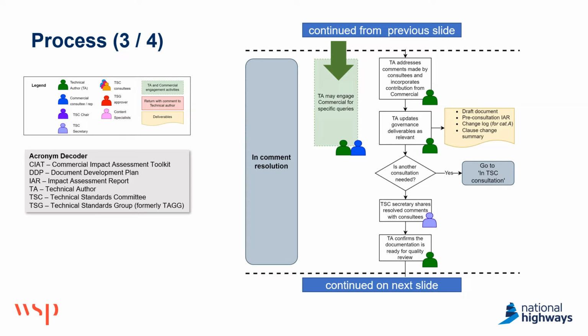Just to clarify, this is about completeness of deliverables and MDD compliance, but the quality checks will stay with the Technical Standard Committee and the relevant chair. An important deliverable that needs to be completed at this stage is the change log. This will be used by commercial for quantitative cost assessments. It plays a key part in the quantification. It needs to be complete and provide all information needed to understand the changes made to a document.